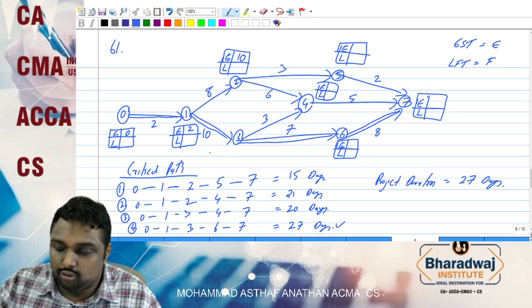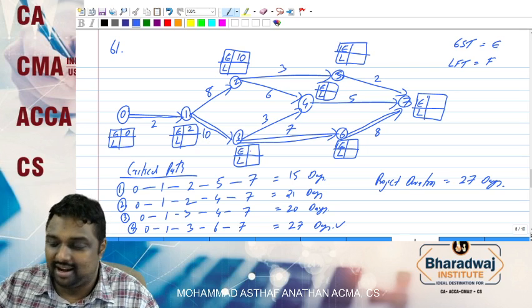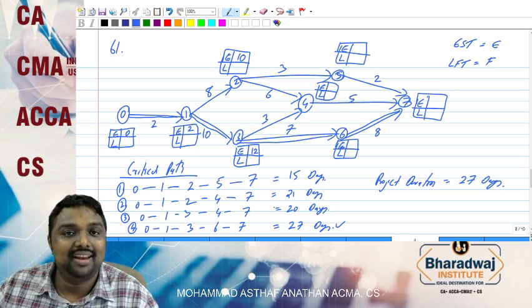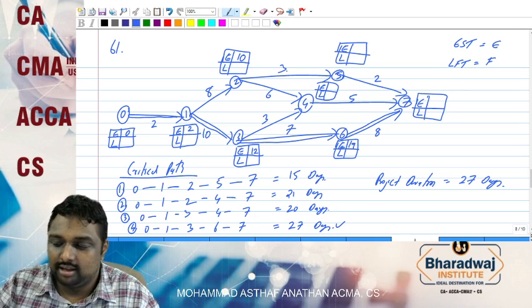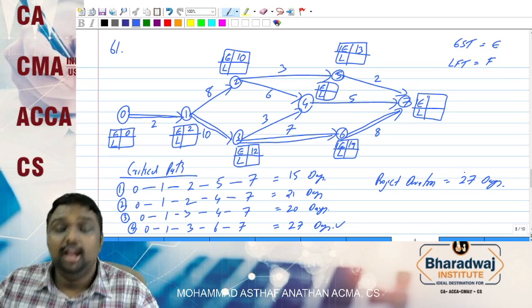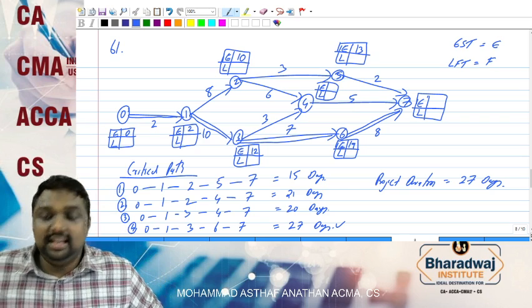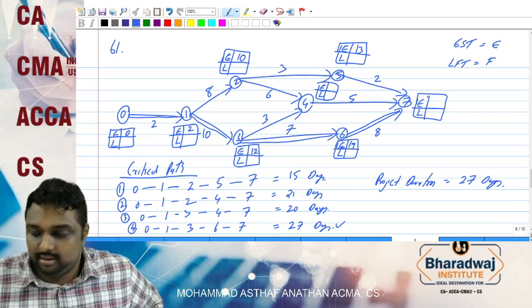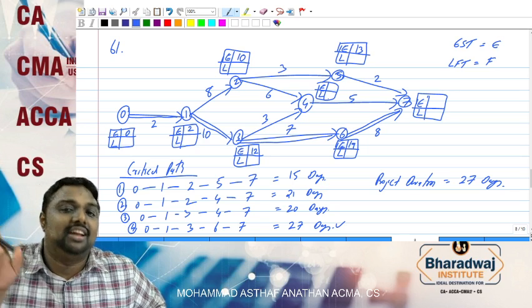Same thing. Here you have 2. For each node it will be there. So here you have 2, here you have 10, add, you will get 12. Here you have 12, here you have 7, it will be 19. Here you have 10, here you have 3, it will be 13. How interesting. Now the main important point. Now listen here. Here we have 12. Duration is 3. 12 plus 3, 15 will come.